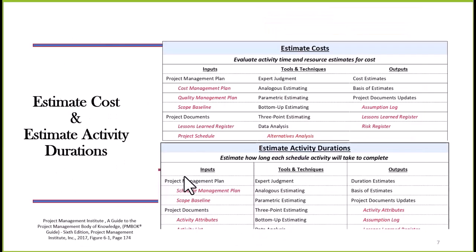One of the first steps that we have to do in any project as we start planning the project specifics is to estimate the cost for each activity. How much is it going to cost? These costs are what the baselines will be made up of. The cost is also where we will manage our earned value to make sure we're spending in accordance with the plan and trying to understand how much value we have created in the project itself.